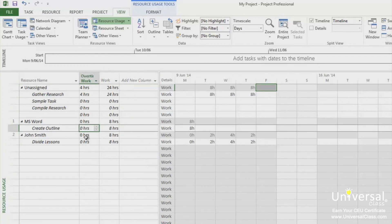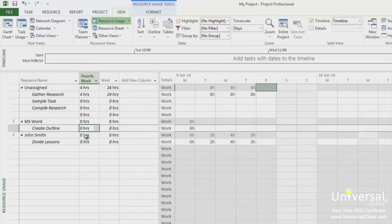You should note that if you enter overtime, Project 2013 will assume that effort-driven tasks have shorter durations. If that's not true, you'll have to edit the task duration.